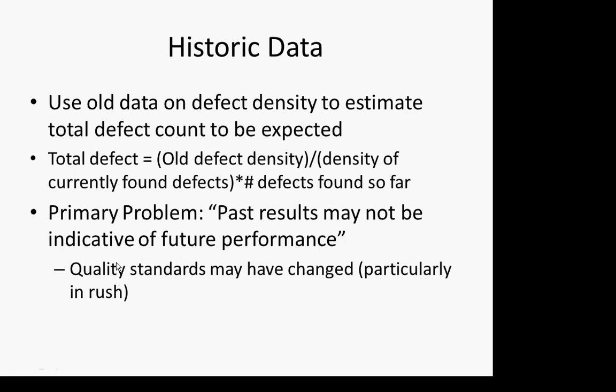Maybe you start using pair programming, and then you plan on a lot fewer defects. Good. Your processes have changed. Maybe you put in place aggressive pair programming, aggressive peer review or better testing infrastructure. Maybe you're doing work this release using largely the component of your browser technology that has to do with scripting, and past versions have dealt more with fundamental issues concerning CSS or XML. And so you can't really often directly compare bugs here with bugs in previous versions, because the defect density might be very different.